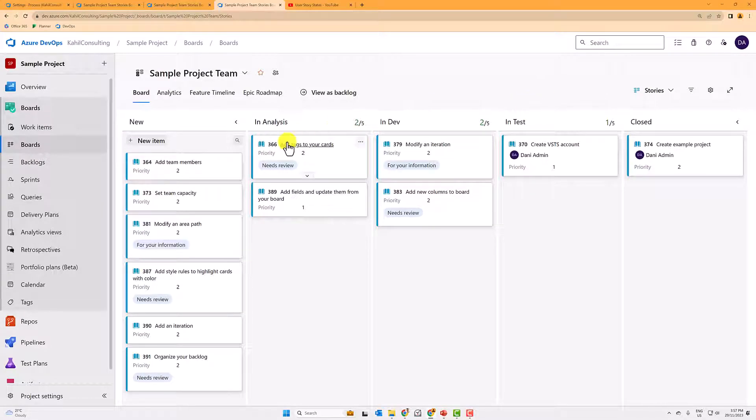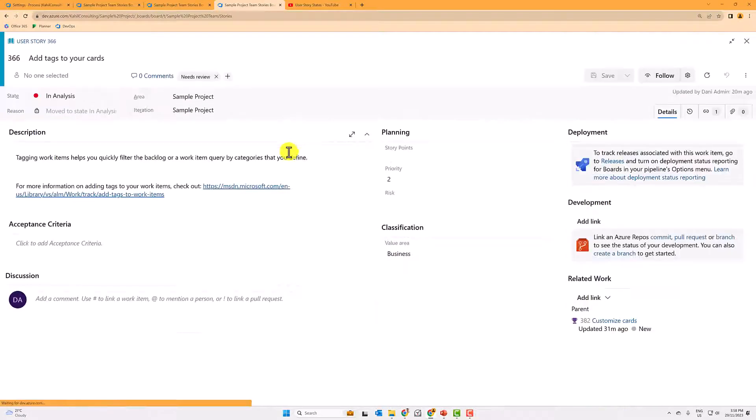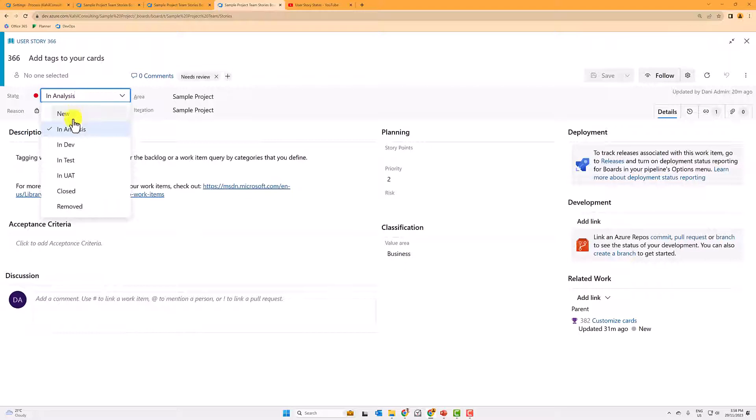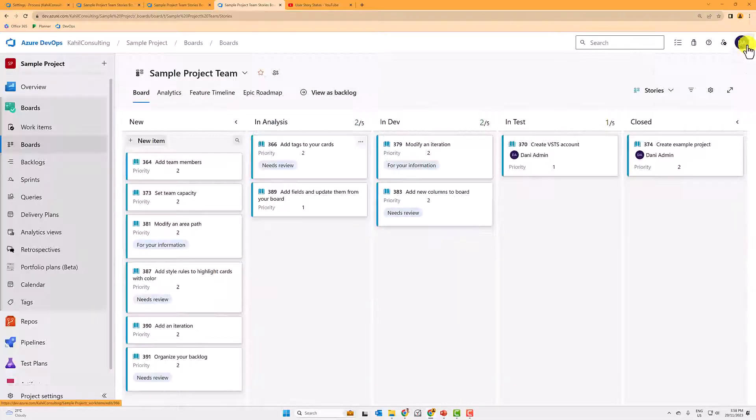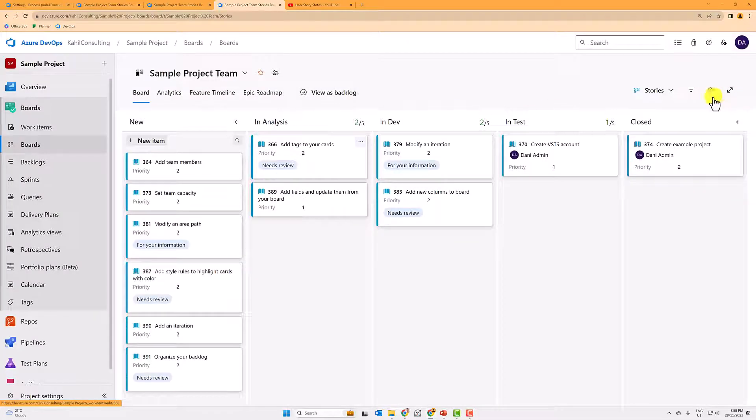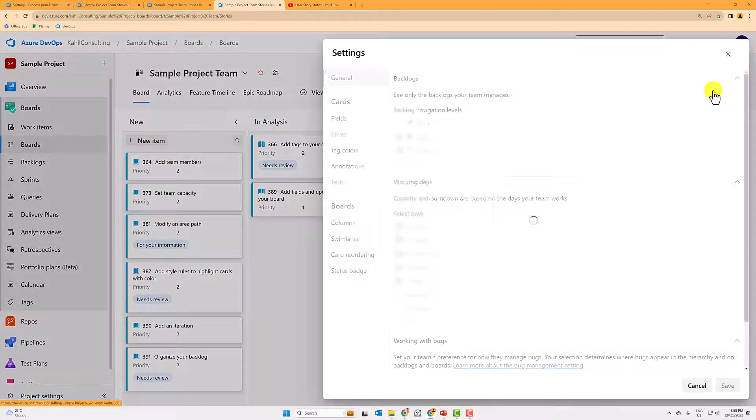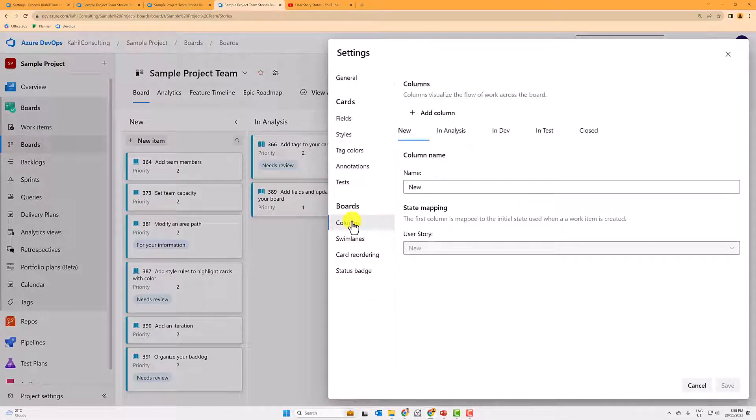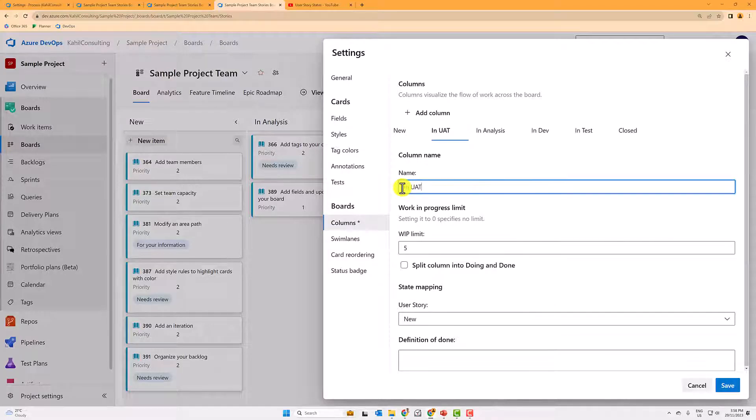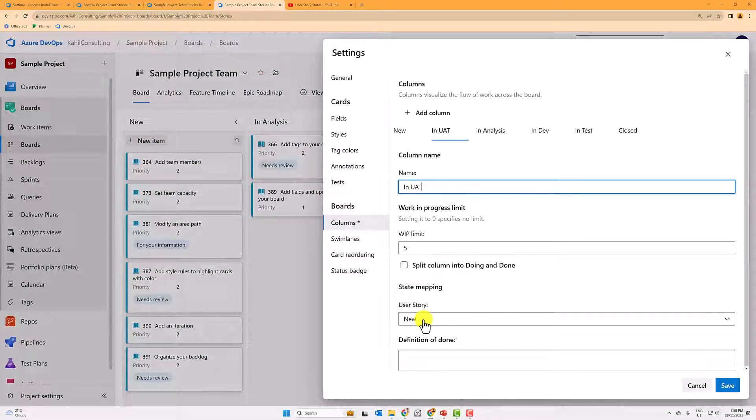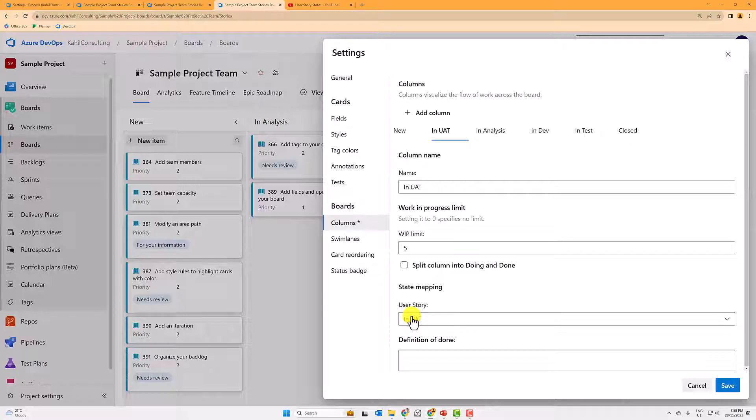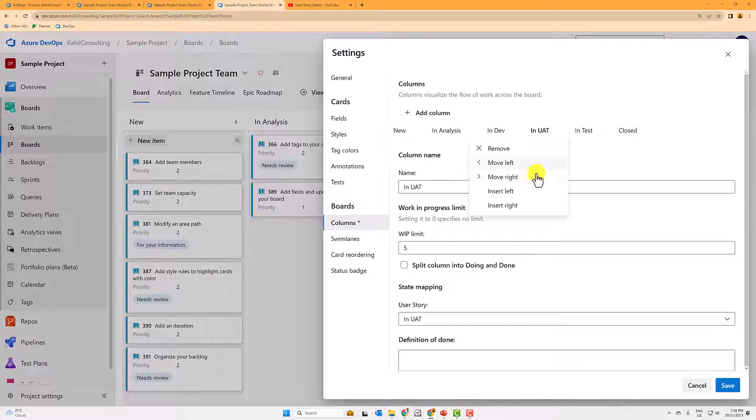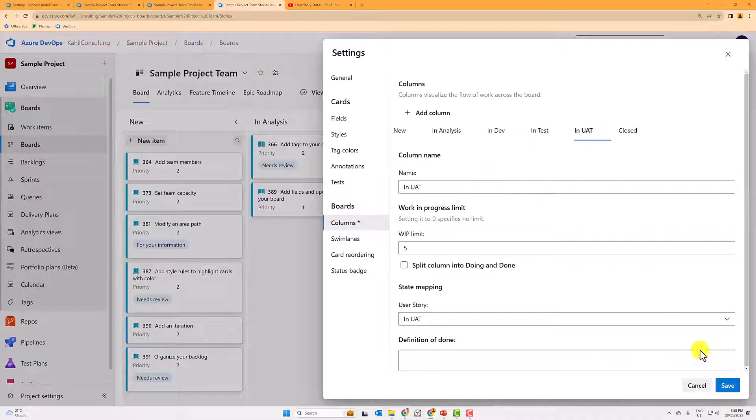So let's say you have new analysis in dev in test close, but if I open a user story, I'm actually missing the in UAT, for example. So if you added that or if you changed the states of your user story, don't forget to go into the board and add an additional column. So how to do that? You would go here and you will have to manually add in UAT, for example, and map it to the user story state.